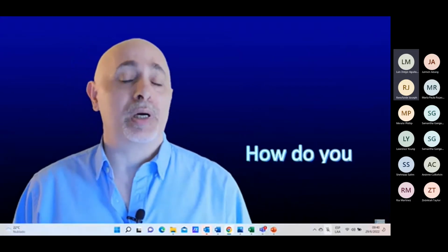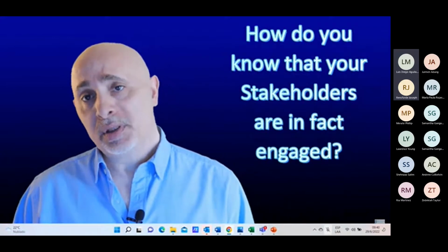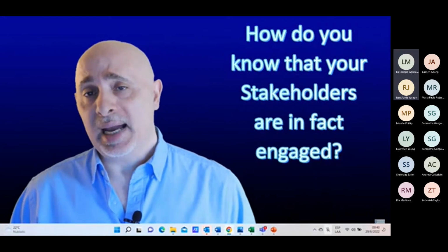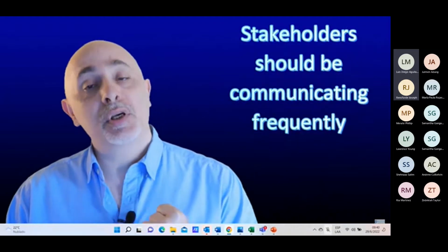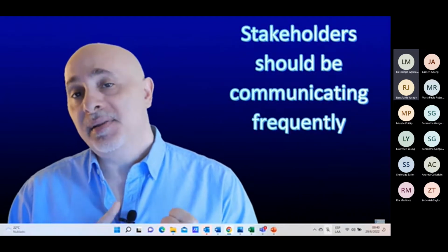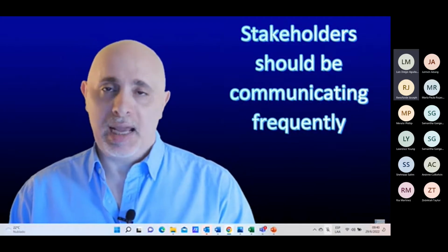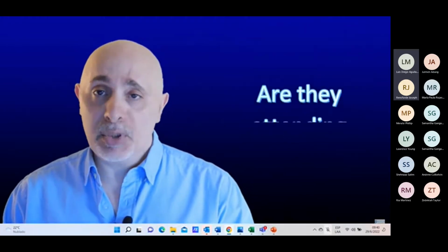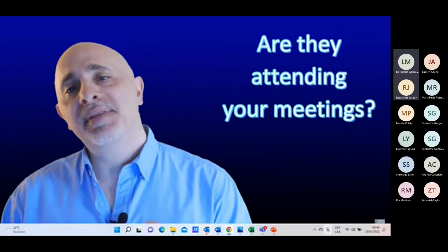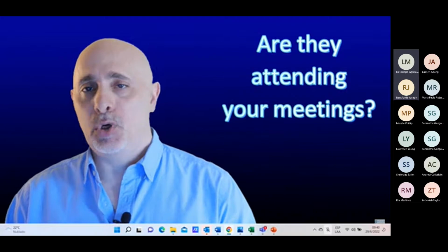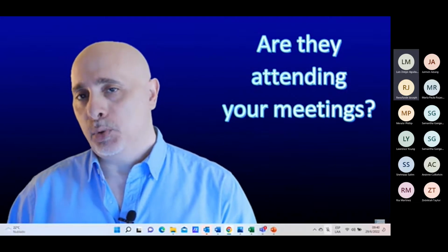All right, so then you've done all this work. How do you know that your stakeholders are engaged? Well, there's a few things you could look at. Number one, frequency of communication. Are they communicating with you? If the communication has slowed down, it's either they're distracted or they're not interested or they have an issue with you. Are they showing up to the meetings? Are they showing up to the workshops, right? Are they participating? If they are, that's a good sign. If not, then you have to go figure out why they're not doing so.